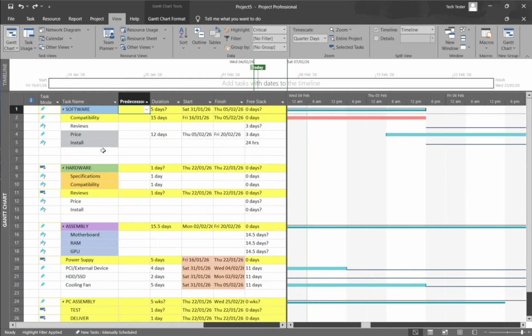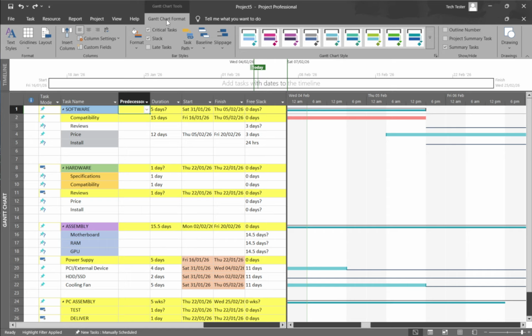Finally, if you'd like a quick highlight without leaving the Gantt chart, use Task Path. With the Gantt chart active, go to the Format tab, click Task Path, and select Predecessors. Project immediately highlights all tasks that drive the selected task. This is perfect for tracing the why behind a date change during status reviews or for quickly confirming which tasks must happen first.